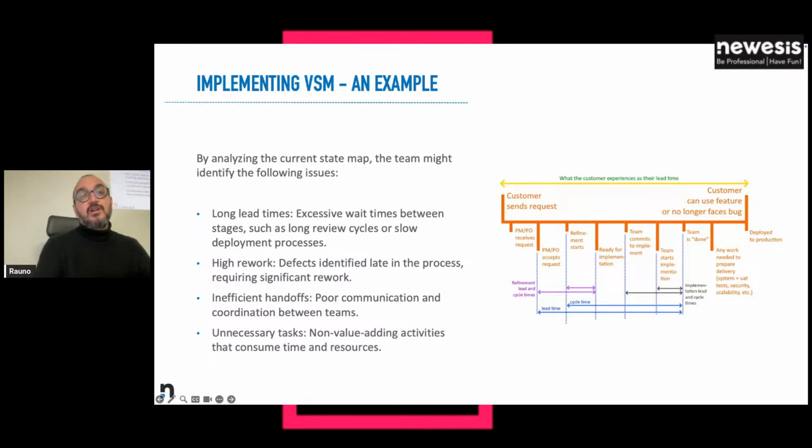You can have a process where your 10 requirements come in parallel. They go to your stakeholder for the sign-off, but they also go to your PO for having been put in the backlog. Your PO starts putting things in the backlog. And in parallel, the stakeholder checks, and then the stakeholder will just communicate, I don't want this one. And the worst case is that this was already inserted in the backlog and needs to be removed. But the other 9, in the meantime, have already been done. You don't have to wait and waste your complete lead time.